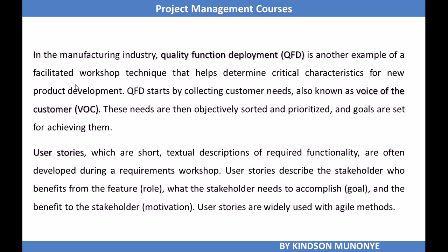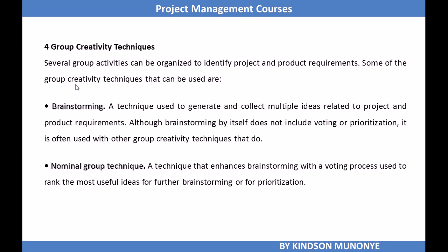User stories, which are short textual descriptions of required functionality, are often developed during a requirement workshop. User stories describe the stakeholder who benefits from the feature, what the stakeholder needs to accomplish, and the benefits to the stakeholder. User stories are applied mostly in agile methods.